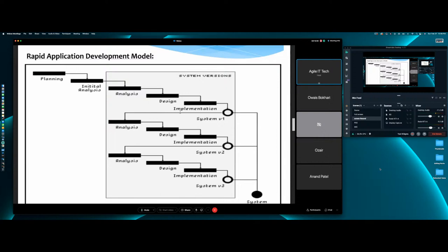As a project manager, one of our jobs is to identify all the different modules of the project and identify which can happen in parallel and which cannot. That's how we bring the timelines in, by doing parallel development. On things that can happen in parallel, I'll bring them in. I can have the electrician and the plumber doing work at the same time in the house, but I can't have the framer and the roofer at the same time. It all starts with the foundation.